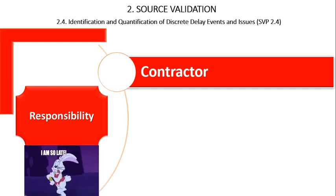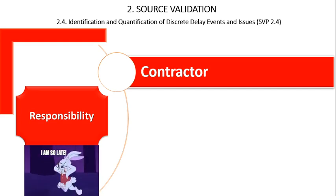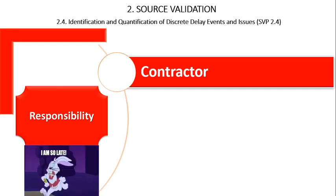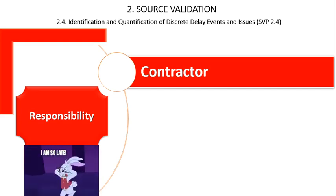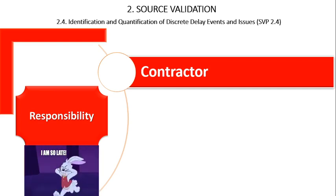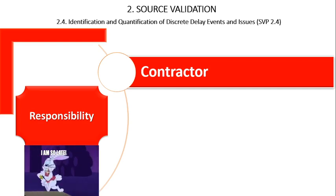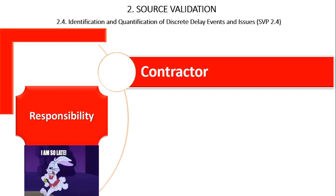When the forensic schedule analyst does not possess adequate information to make an independent determination of responsibility for the delay, the analyst may have to proceed with the analysis based on an assumption. Such assumptions should be noted and clearly stated as part of the final analysis product along with the basis of such assumption. Contractor delay is any delay event caused by the contractor or those under its control, or the risk of which has been assigned solely to the contractor.